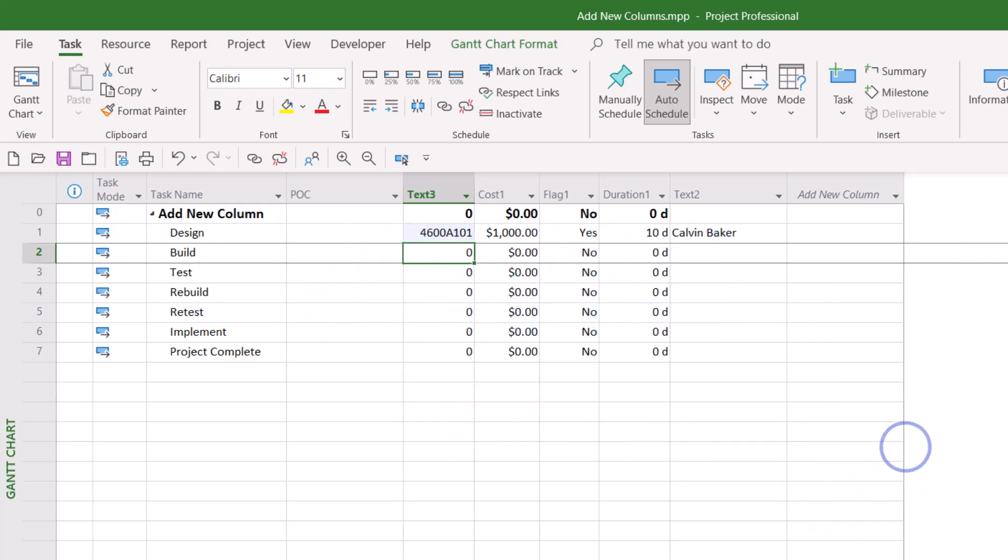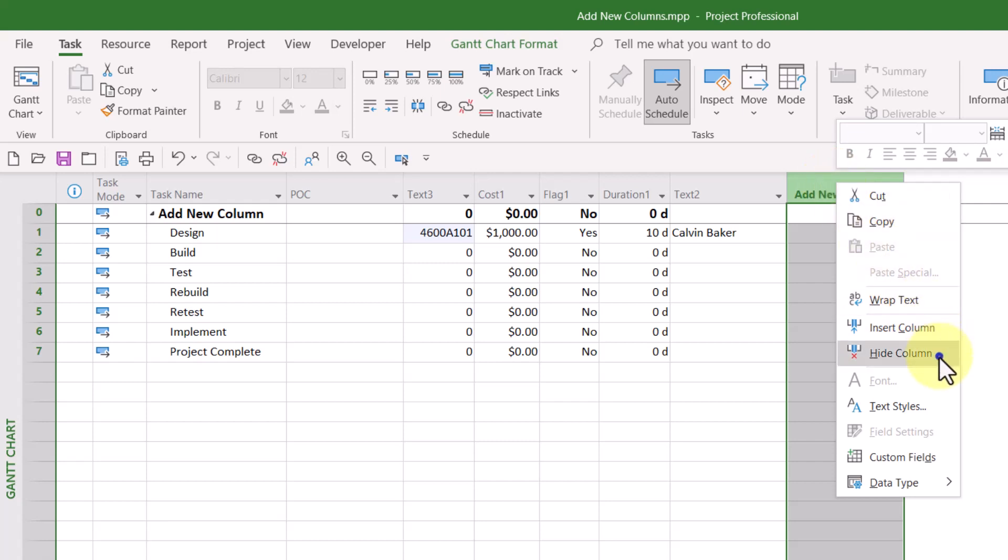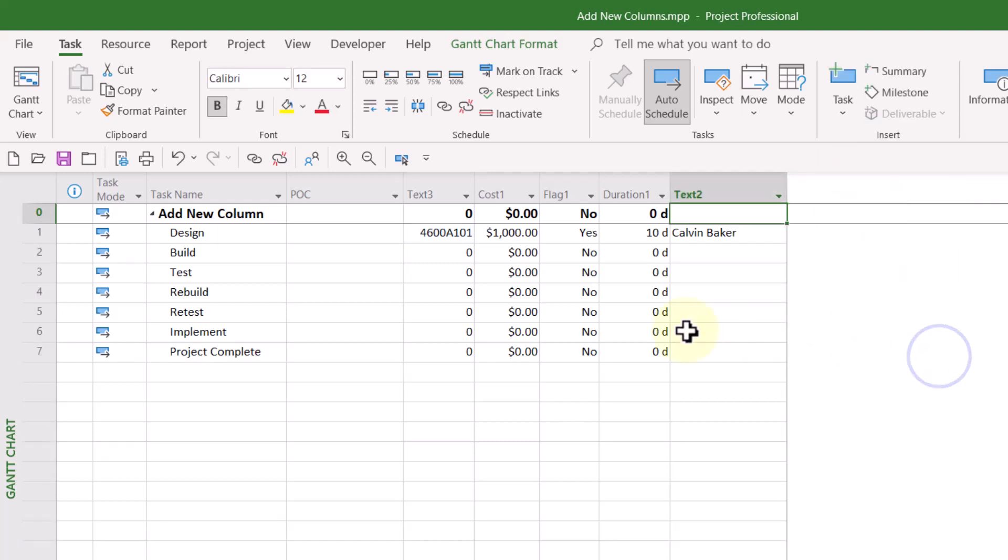One other bonus I would like you to know is you are not required to display the Add New Column Virtual Column in every table. If there's a table where you do not want to see this column, it's very easy to get rid of it. Simply right-click on the column header of the Add New Column Virtual Column and select the Hide Column item on the shortcut menu. So there you have it.